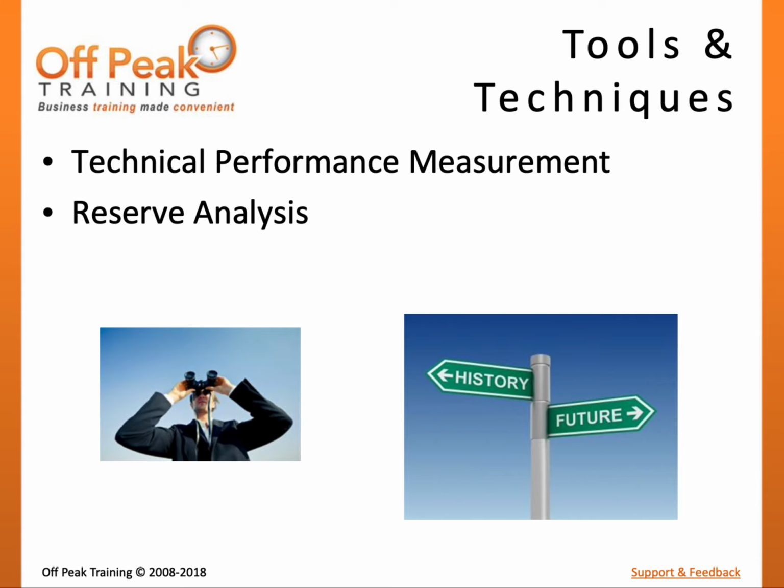If the risk has actualized, it can be useful to measure the amount of reserve that was allocated versus the actual impact of the risk to help improve the ability to capture lessons learned.